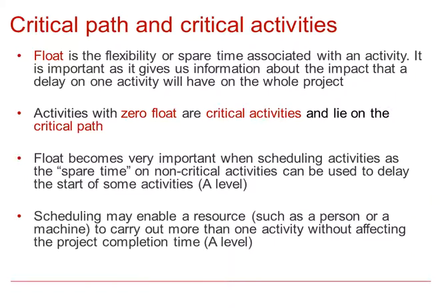Activities with zero float, in other words no flexibility, are the critical activities, and these will lie on a critical path. Float becomes very important when scheduling activities, as the spare time on non-critical activities can be used to delay the start of some activities. If you go on to A level, you will cover this then. Scheduling may enable a resource, such as a person or a machine, to carry out more than one activity without affecting the project completion time. Again, this is covered at the next level.